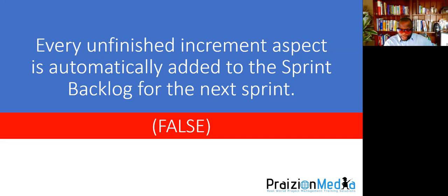So unfinished items need to be reassessed, and then it will be decided what is done with such. Could they find their way into the sprint backlog for the next sprint? They could, but remember, the next sprint is immediately after the current one. So to say, put it into a sprint backlog is premature because you haven't even had the sprint planning session.